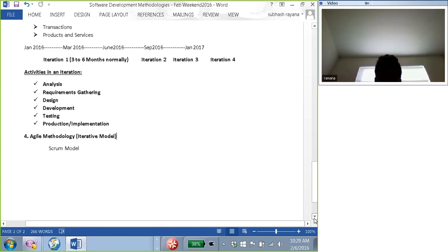If the project status is green, it means that everything is going as per the plan. Our plan was to deliver the project in 3 months. Based on the current status today, we are good. We are doing well. We will get it done.